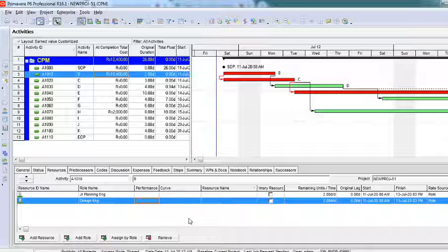That's how human resources performance and everything can be monitored and maintained through Primavera. If there is a lag in the project actuals, there's less time and we have to do more work, we can tell how much more productivity we need from every human resource. I'll repeat, if you find in the execution that the time is less and more work has to be done, then with the help of Primavera, we can tell how much more work each and every human resource has to do.